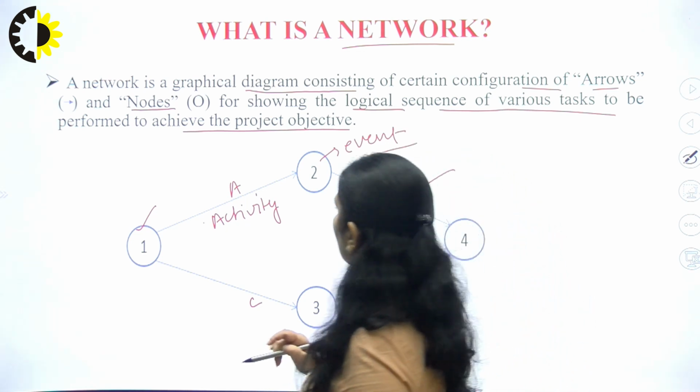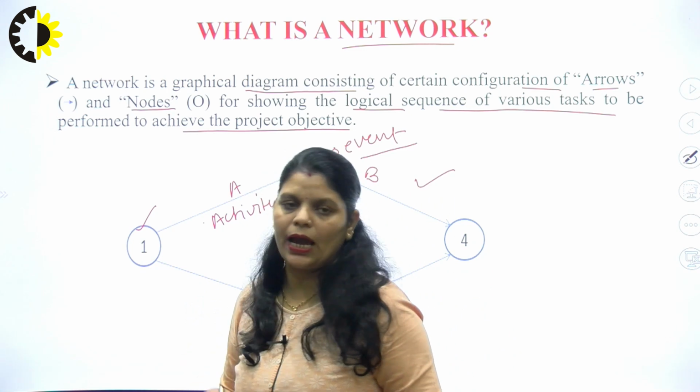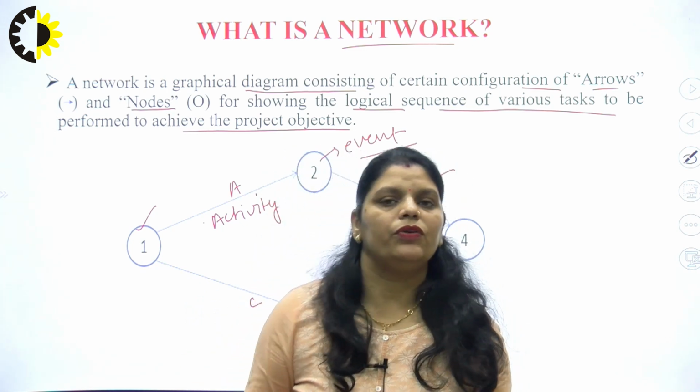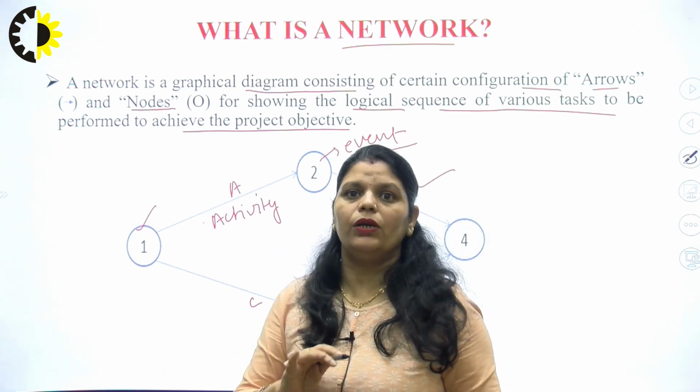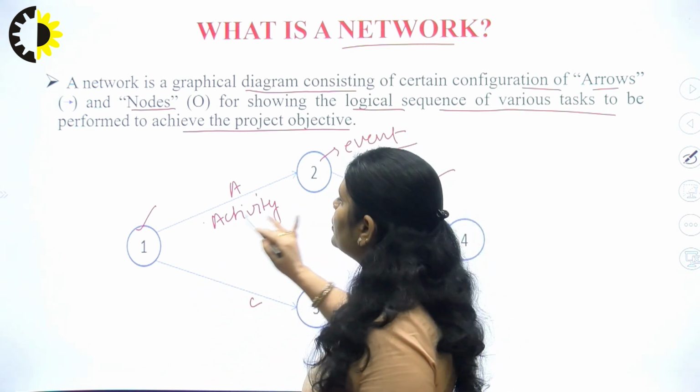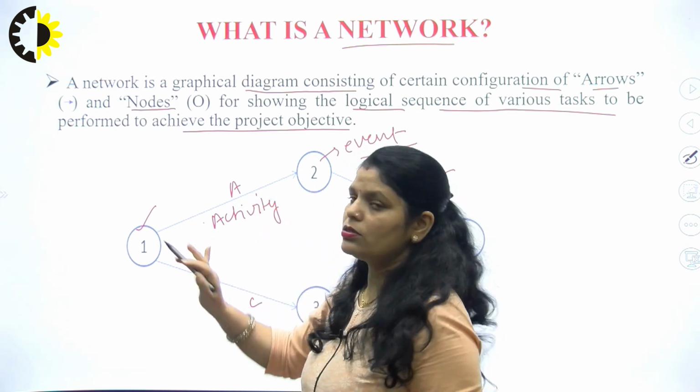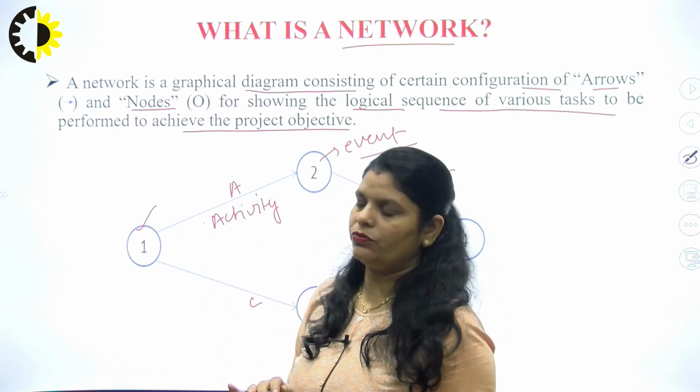Okay. And one more thing which we have to remember: activities will consume time, but the events or the nodes will not consume any time. This will only show the start and ending of an activity.